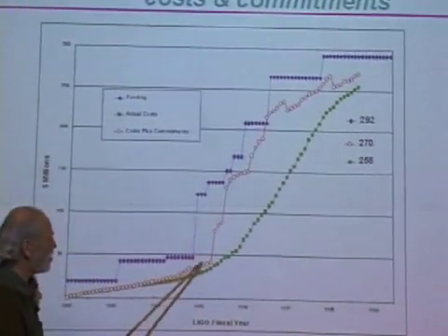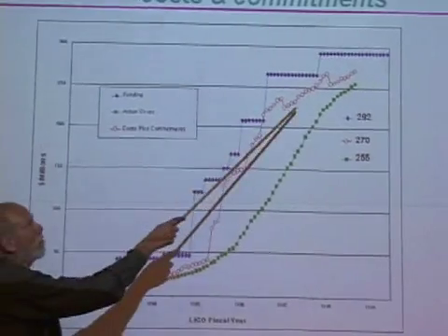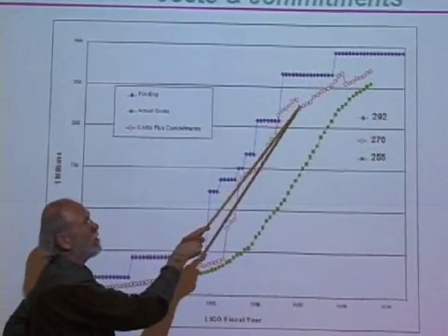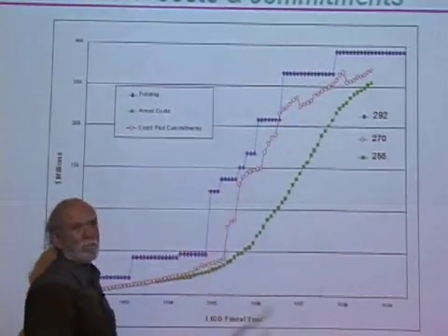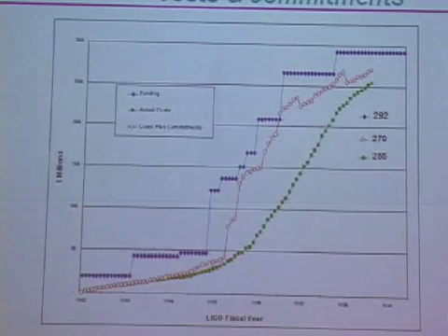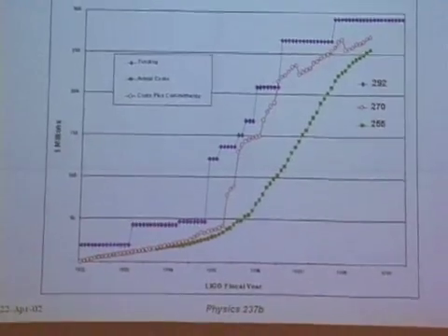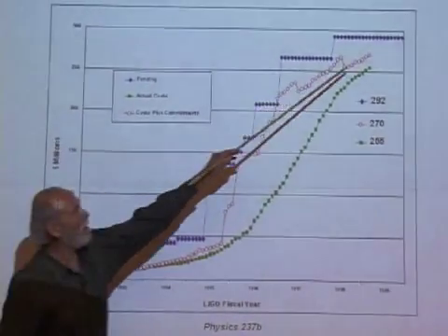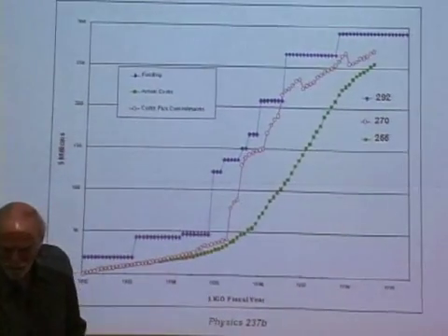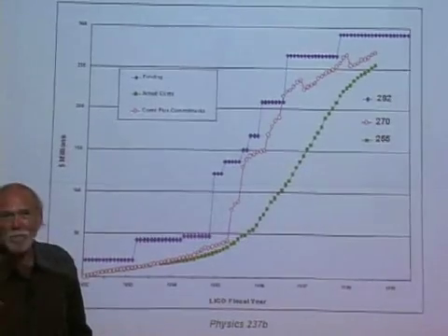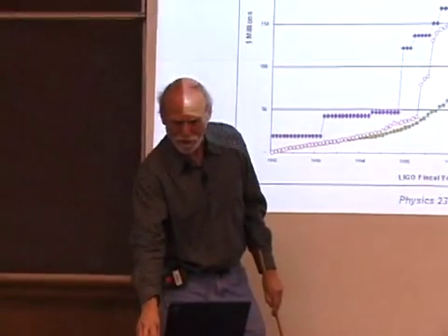You can see I didn't bother with them very early. But when it got closer, we decided not to put some rug on a floor somewhere, things where you could make choices to make sure it would be all right, and then add them at the very end. I'll show you how you do that. So that's a knob you have, and how you spend this contingency is the other knob.